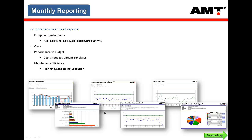Monthly reporting in AMT is split into equipment performance reports — availability, reliability, utilization, productivity — cost analysis reports including cost versus budget, and maintenance efficiency reports such as planning reports, backlog aging, service accuracy, and quality of work performance. An example of the latter would be mean time to first stoppage after PM. We try to have KPI reports measuring the outputs of the process — equipment performance and costs — but also performance KPI reports around the maintenance process, particularly planning and execution of work.